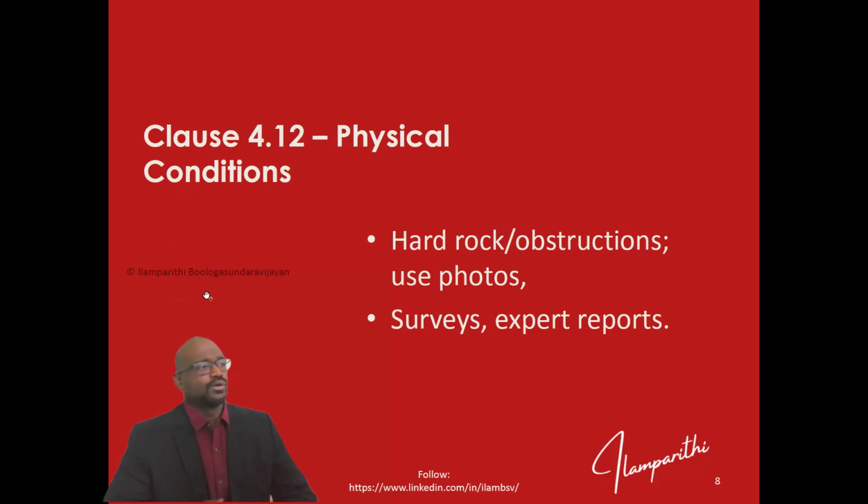Class 4.12, physical conditions and forcing physical conditions, that might be any hard rock or obstructions found below. So use photo evidence to prove that, and give them the survey reports. For example, sometimes there might be heavy high voltage cables going underground, and you have to prove that we did an electromagnetic survey, but we were not able to find those cables. We were able to find them only when we started excavating.